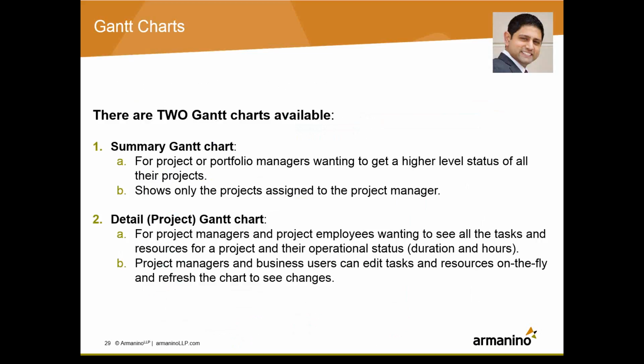It's going to look at the projects, and if you're using task resourcing, you can look at the projects only assigned to a certain project manager user. And usually the summary Gantt chart gets exposed in just like the individual project records, but also as a module report, you can actually run a summary Gantt chart for any project that you actually filter off of. The detailed one, you haven't seen that yet, but I'm going to show you a snapshot in the next slide.